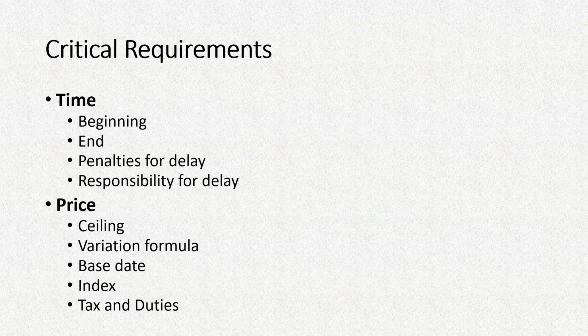Sometimes it may be the client. Suppose in some cases, some materials may be provided by the client instead of being procured by the contractor. So if the client makes delays in supplying those materials, in that case the client will be responsible for those delays, so the contractor cannot be held accountable. So all these things are to be again included in the contract documents.